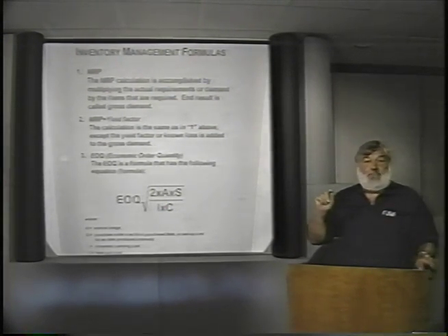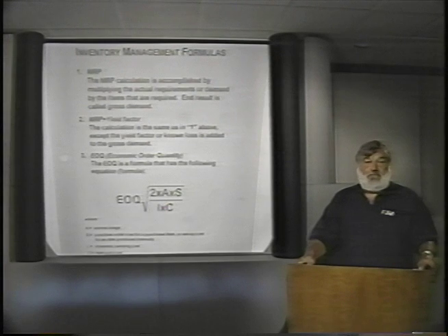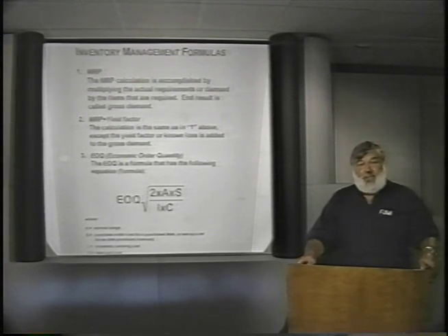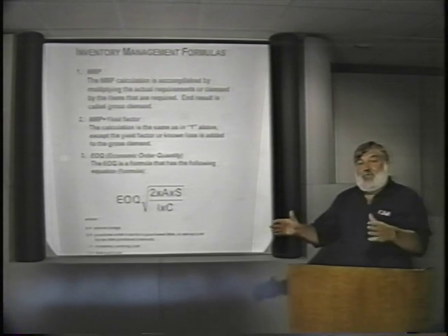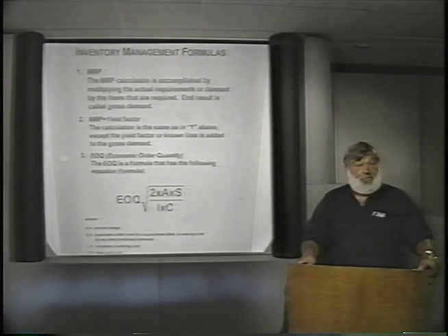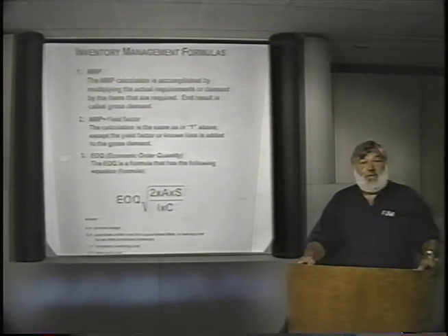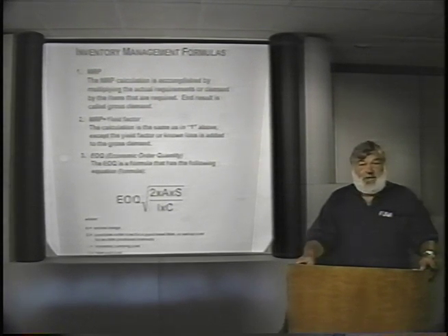If the purchase price of the 100 feet is applied to the planned maintenance work order, and the 5-foot cropping occurs, the financial value of that 5-foot piece, or the yield, is 0. Therefore, I should develop the procedures on how to physically dispose of that particular yield factor. And that's all there is to it.